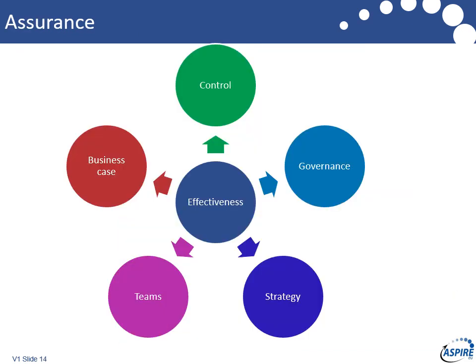So assurance is a key element of control. There's 2 or 3 ways of looking at assurance. One of them is basically it's an independent view, so it can be done as a planned thing, or it can be done as a gate review, which is a very important area. And what does it look at? Well, it looks at controls like this, and it takes an independent view of the way you're doing it, and are you doing it well? It's looking at how does the governance work? Is it clearly defined? You'd normally ask, is it making good decisions? All those kind of things.